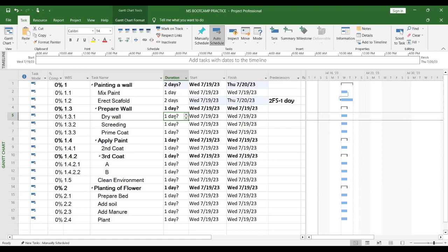If you have watched my video on estimation, there is what I call basis of estimate. Please go and watch that video. You fast forward it to where we have basis of estimate. I think, did I share the slide of that class? I'm not sure I did. If I did, go to the area where I have basis of estimate. I want you to go and watch that part. There, I mentioned a lot of assumptions that can form the basis of your estimate. So for drying of this wall, one of my assumptions is, what time of the year am I in? Let me assume I'm in December or February. That means within 2 days, a 1-story building wall should be dry after plastering. What do you think?